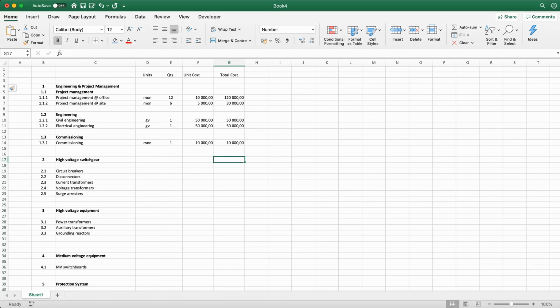So in the end, because we can make broader ranges and not take care, just select the items which are needed to be there, it's easier for us to debug, because if you have an overall subtotal which shows X and you have two subtotals which show different values, you can already even visually understand where there's an error, and with sums it's much more difficult.